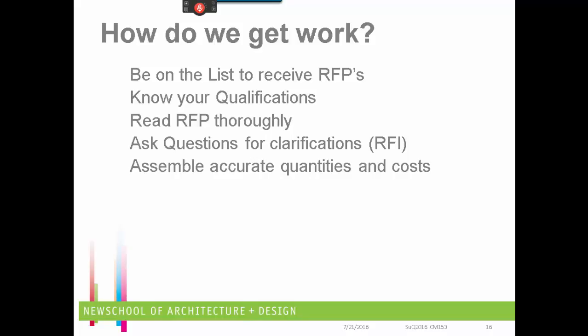I was working on a project in central Wisconsin where there were no major contractors. In fact, most of the contractors were part-time people who worked on farming and did construction during their off time. We couldn't find anyone who would guarantee over 175 units a day per man. So our project was budgeted on a normal productivity rate, and because of that we needed to find the right mason.